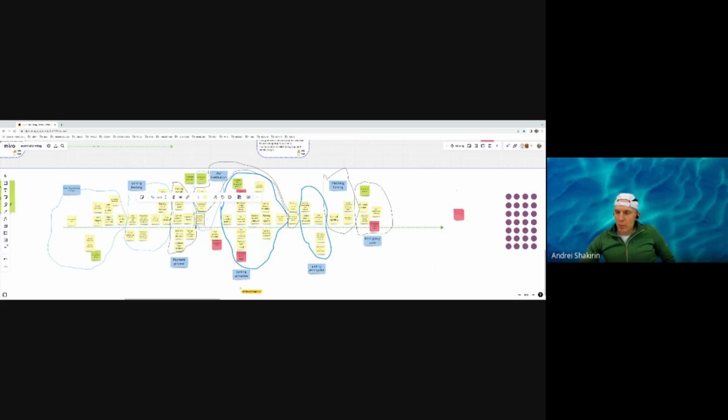So this is the thin slice we use for the MVP. For that, I would propose that we use our dots and vote to put the dots on the events which we think are important for the MVP. So let's take, I don't know, 10 dots for every person. If you don't use all of them, then there would be fewer. Set a timer for perhaps 3 or 4 minutes.